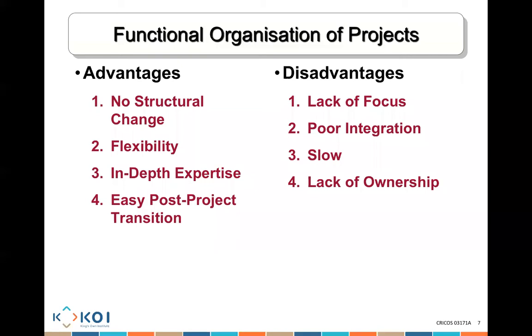However, there are disadvantages. There is a lack of focus. Because you are working in your functional department and you're doing both project work and functional work, there's no focus. The functional work will always take priority over your project work. There's poor integration. Why? Because departments like HR, marketing, IT, sales are not really coordinating together to get the job done. I finished, take it to them. They finish, take it to them. They finish, take it to them. And because there's no priority on getting that job done, the work tends to be done slowly. You're not actually getting things done the quickest possible way.